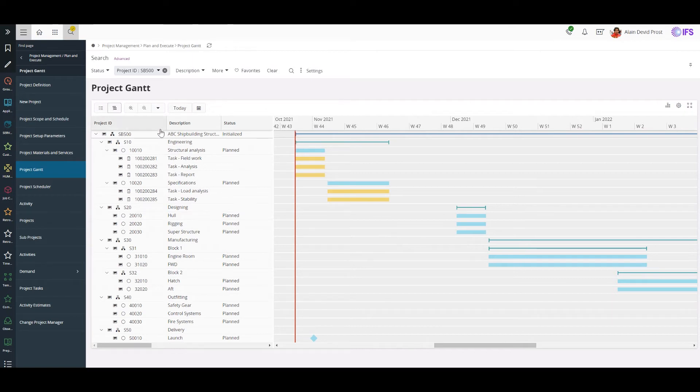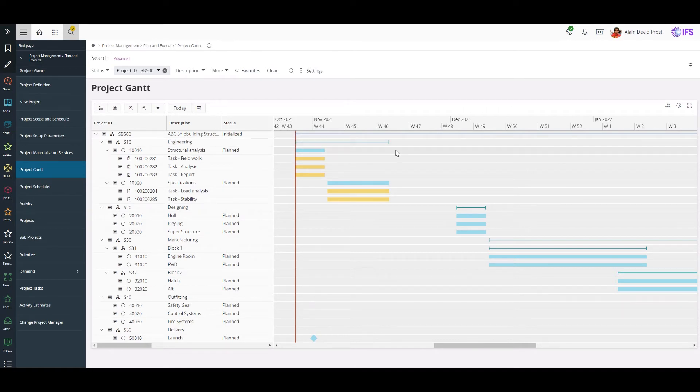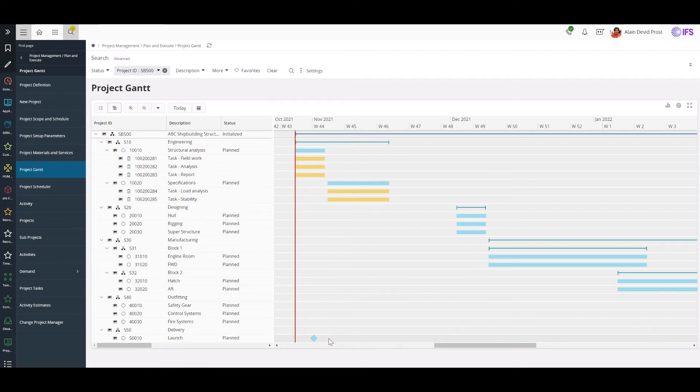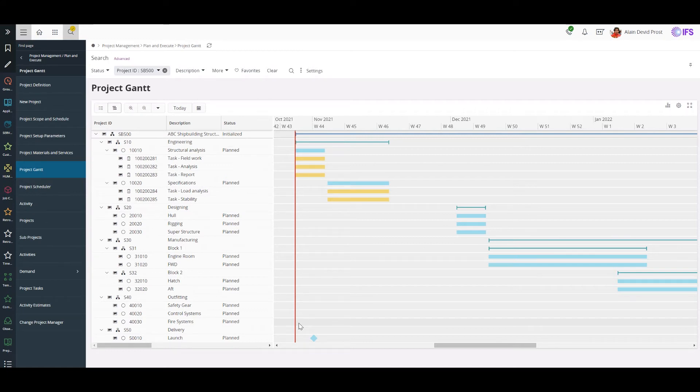Here is the graphical representation of my project. These thin bars represent the subproject, these thick bars represent the activities, and we have used different colors to represent the tasks of the activity. Also the diamond shape is used to represent milestone activity and this vertical red line represents the current time.